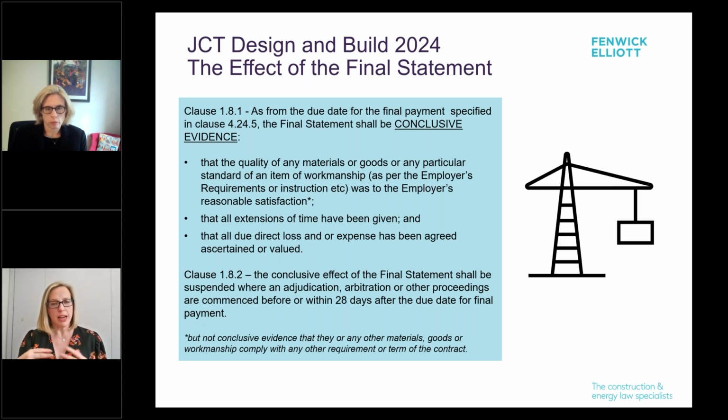So if there are any aspects of the final statement that you dispute, these have to be referred to proceedings within that 28-day time period, or else you lose your chance to challenge it later. So that's a pretty extreme consequence, and 28 days is a tight time frame.